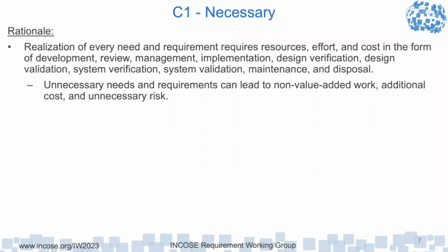And then when the tender is bid, they'll bid, say, 105 within the range 100 to 120. And then the customer has a choice. They can sign them up to essential 105, and we would keep that as an attribute. So you'd have in the database three attributes: what was originally requested in terms of range, so 100, 110, 120, and the final contract would be 105, and that would become the essential requirement.